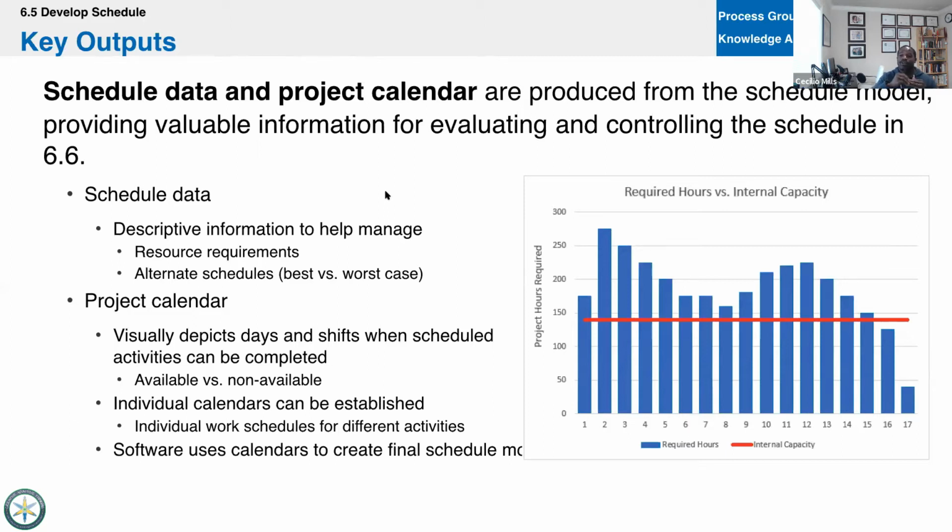your schedule, right? You may have all of your estimates using 3-point estimates, using beta or PERT, and then using the standard deviation, you can have a confidence interval of 68.26 or 95.46 or 99.73. You could have 3 variations of the schedule. That's where you see those alternate schedules there, right? So that's what schedule data is for PMI.